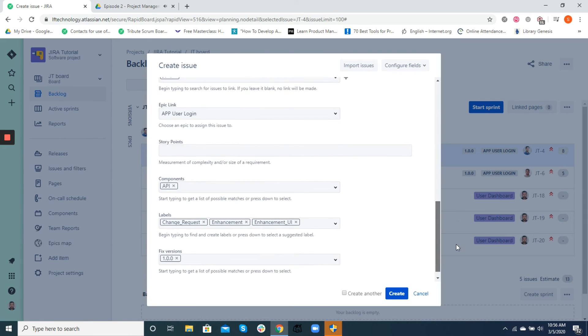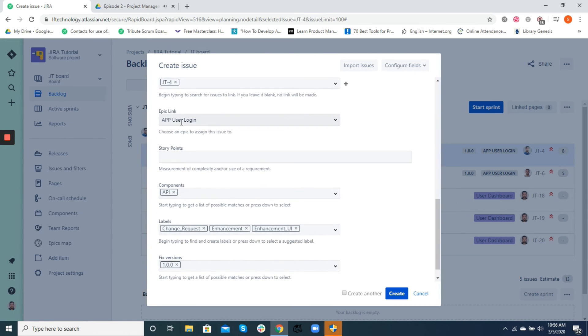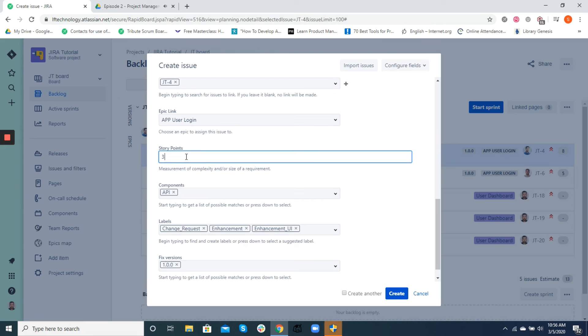A story point is a relative measure of a user story which is based on complexity, volume, and the uncertainty associated with it.